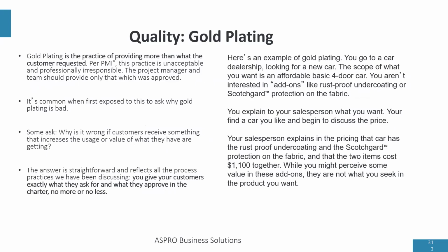Now, what is gold plating? Gold plating is the practice of giving the customer more than what they requested. According to PMI, this practice is unacceptable and professionally irresponsible.